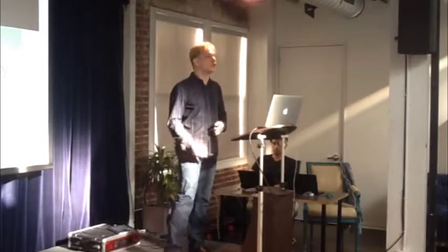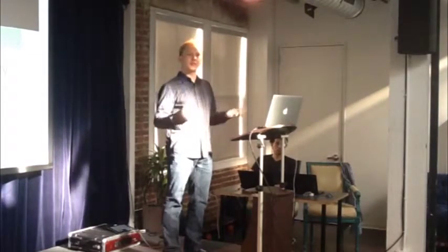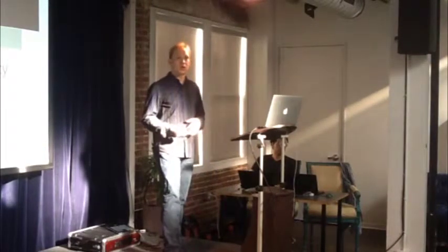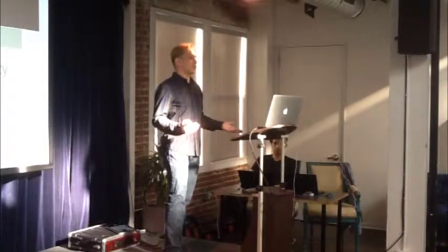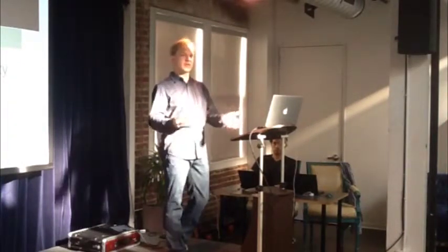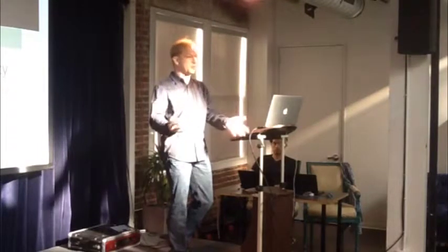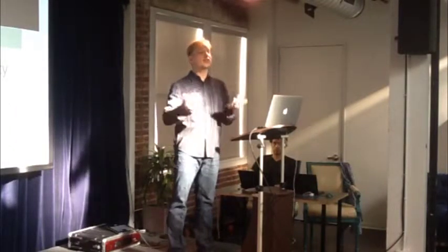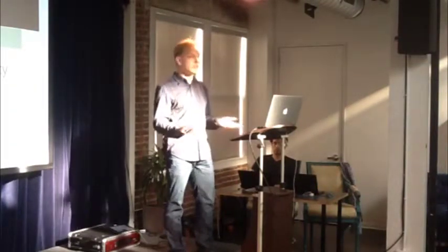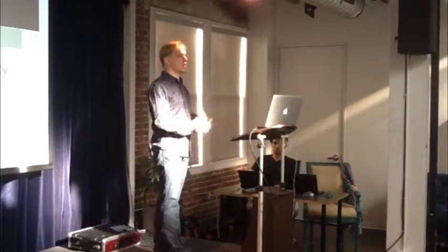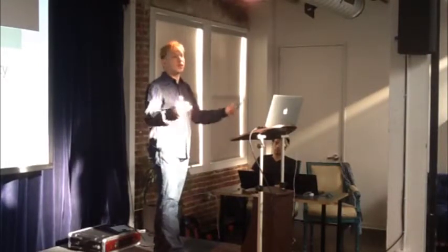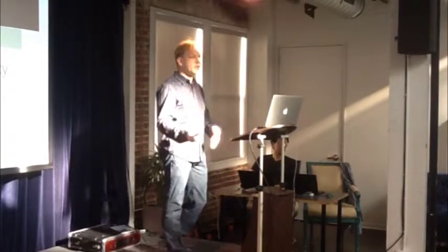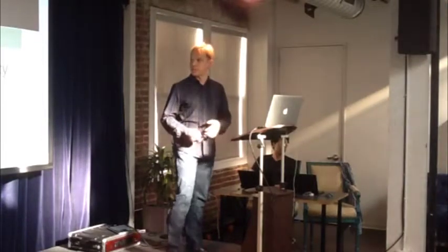The last one is negotiating estimates. This is something that falls more squarely on the project manager or the client side of the line. So estimates sound a lot like prices. When you come to a developer and ask, how long is it going to take to do this, or how much will it cost, and they say $6,000, that sounds like they're giving you a price for what it's going to take. The same is true if you're using internal developers, because your internal developers make a salary. So if a developer costs you $2,000 a week and they say it takes 3 weeks to get this done, they've effectively given you a price of $6,000. So either way, the calculus is the same.